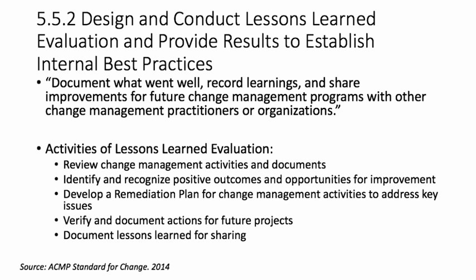The activities of a lessons learned evaluation are to review change management activities and documents, identify and recognize positive outcomes and opportunities for improvement, develop a remediation plan for change management activities to address key issues, verify and document actions for future projects, and document lessons learned in a knowledge management database or common document storage location for sharing with other change management practitioners.